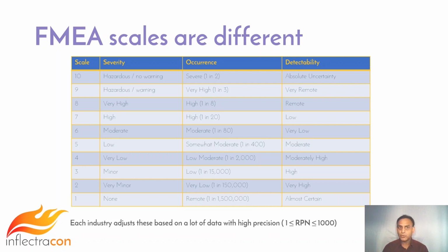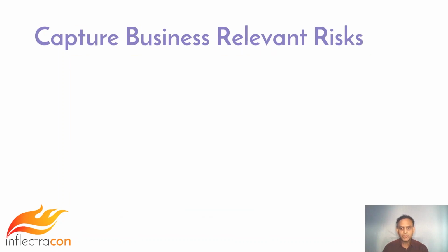Beware of the scales used for FMEA. It is very detailed and frequently uses a 10-point scale for all the three dimensions: the severity, the occurrence, and the detectability. Given here is a table that I have seen in the FMEA-driven initiatives. Mostly, these descriptions are at the enterprise level, but could be customized to the portfolio, program, or project as well. Each industry, company, and product will have some specific and common risks.